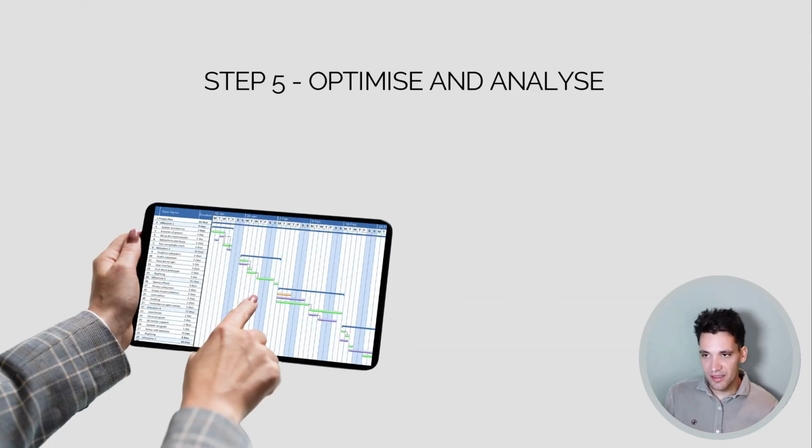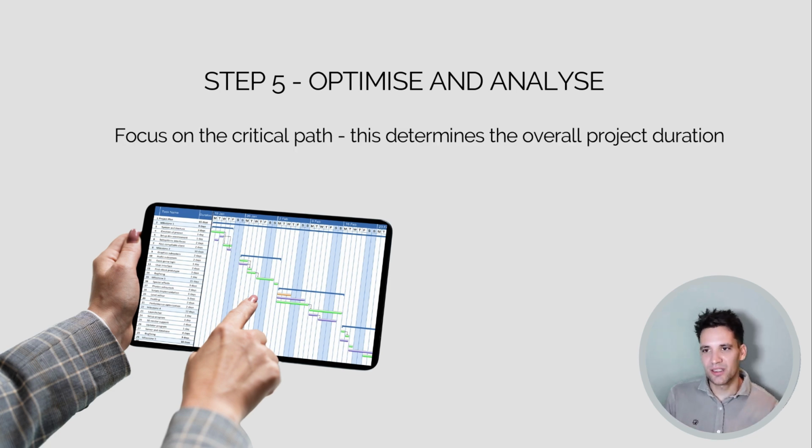When we do this analysis, we're really going to be looking at the critical path and asking the question, is the critical path correct? Because at the end of the day, that is what is determining the duration of the project. That is what has to make sense and be correct. You can be wrong about some activities that have more float. Ultimately, it's not going to have much of an impact on the contract you sign with your client. If the critical path's wrong, if you have incorrectly calculated how long the project will take, it can have big consequences.